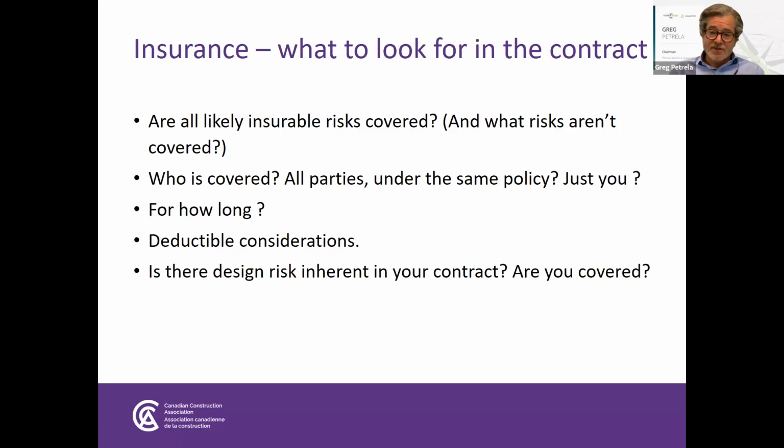That's because insurance does not want to encourage shortcuts, and it doesn't want to act as a warranty where a contractor can rush through the project knowing full well that if it falls apart and doesn't work, they'll get paid to build it twice. So again, it's an uninsurable risk.